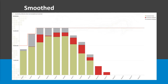With difference constraints, Scheduler knows: find your base level, you can ramp up mining fleets, then we want to be consistent, and then you can come down. I just don't want to see it going up and down, up and down. You can see the green is our direct feed, the gray is stockpiled material, and the red is reclaimed from the stockpile to meet blending requirements. Our mining rate is now nice and smooth, and that's something that can be handled from a hiring, firing, and equipment acquisition standpoint.